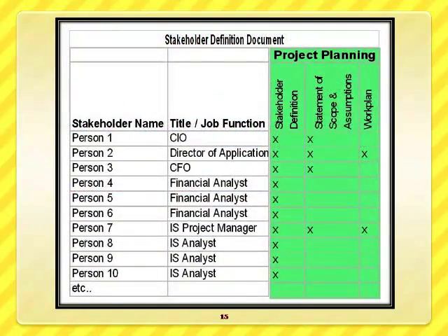In the stakeholder definition, we have to clearly define the stakeholder definition document. When you start building a data warehouse implementation, list out who all the stakeholders are, their names, job title, profession, job function, and at each planning stage, what role they are going to play. Define a matrix like this. For example, in this case, person 1, the Chief Information Officer, will be involved in the statement of scope and assumptions, and he need not be involved in the work plan.